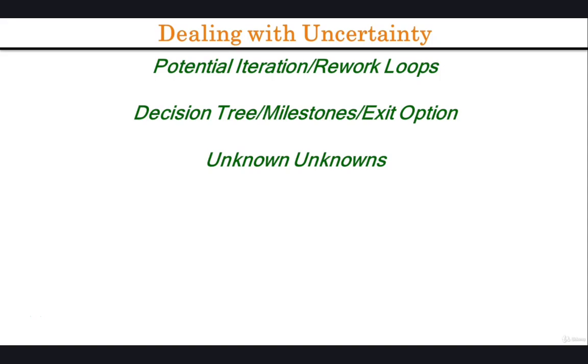Often a useful exercise is to simply list all variables in the project that are currently not known and to look for activities that would help resolve these unknowns. At any moment in time, the project manager should then attempt to spend as little as possible to learn enough to decide whether or not to move forward with the project. This technique, also referred to as discovery-driven planning, will help resolve some uncertainties and potentially identify new ones.